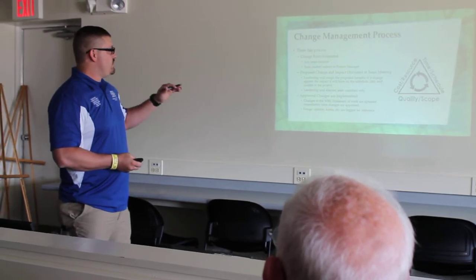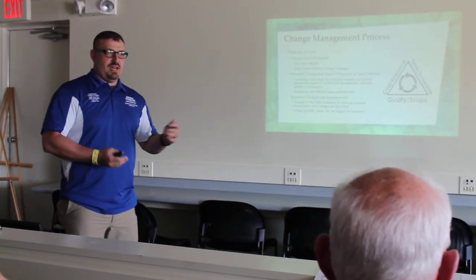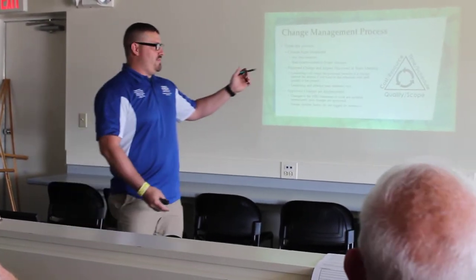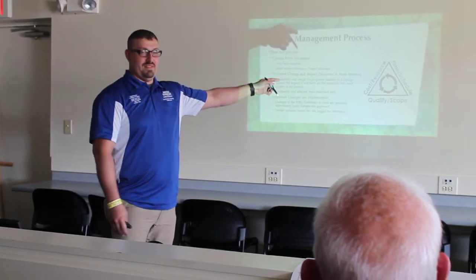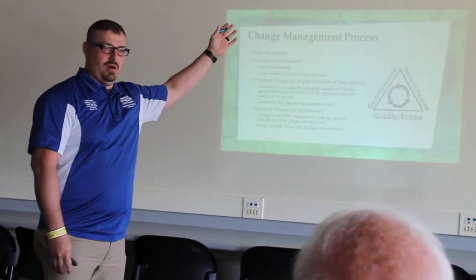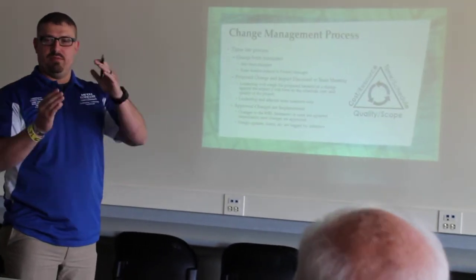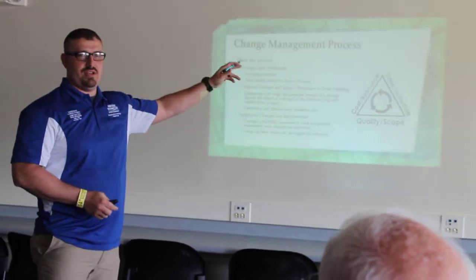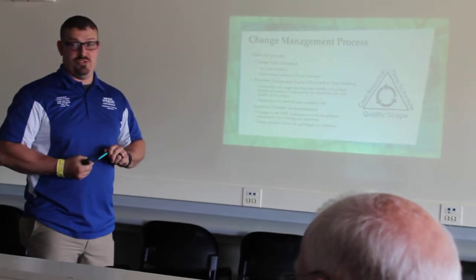Once the form was submitted, we kind of go in and we weigh what it's going to cost us in time, what it's going to cost us in resources, and like we explained, if we wanted to increase the quality of our Formula Hybrid in the same amount of time, then cost would go up. And we always did that with each one of them. If you move two of them, one of them's got to change. And so we ended up doing a lot of this, trying to weigh what we could change and how it would impact our schedule and our manpower.